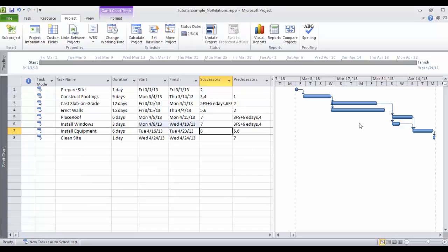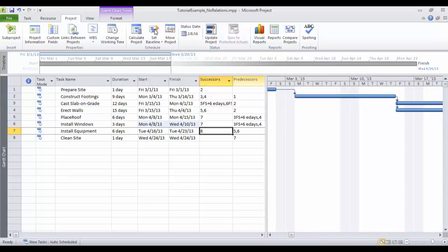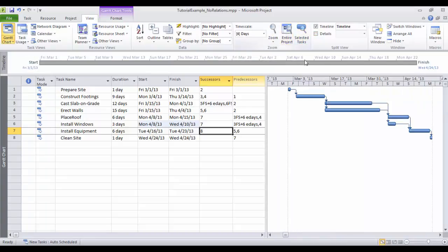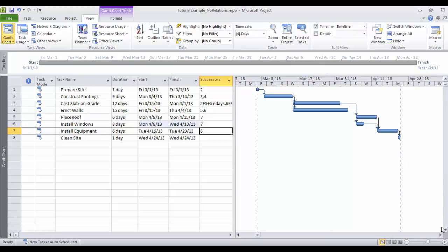The other thing, very important, is related to appearance also, but actually it delivers a lot of information, which is the critical path. So, I mean, critical activity, if you go back to the lectures on scheduling, a critical activity is one that has 0 float. So you cannot afford any delay in it because simply it will mean a delay in the whole project. So what we will do now is we want to show, if we go back to the view entire project, I'll just squeeze this here, entire project, and let's zoom in.